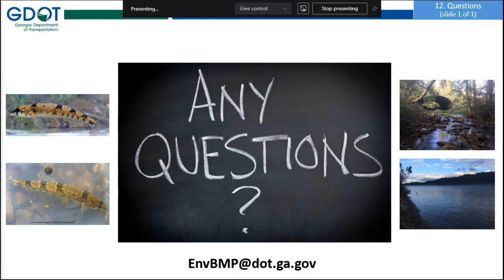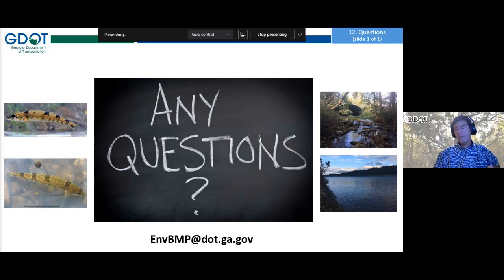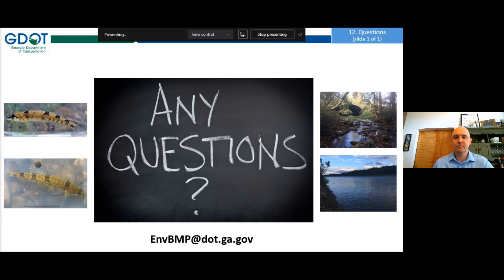Great, thanks, Sarah. This is an important one. Who is responsible for drafting the Ecology Post-Construction Stormwater Report? So the first person that's going to get a hold of it will be, I guess, Ecology when they first start off in the A3M, and then drafting the report, as far as we're calling it a draft, will be done by the designer, and that'll be in the preliminary design phase. So it'll be handed off from the ecologist over to the designer in the design phase, and they'll be doing the drafting. Great, thanks, Brad.